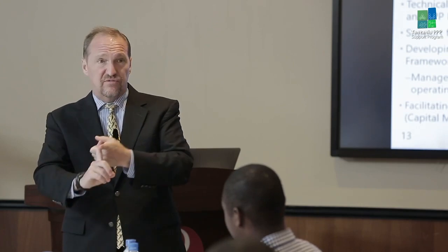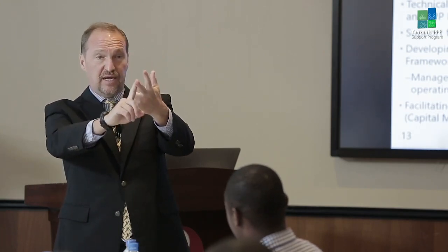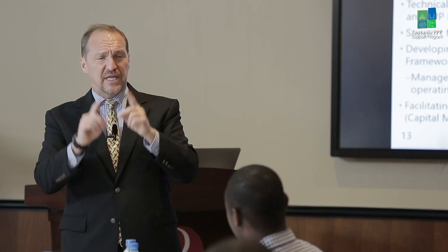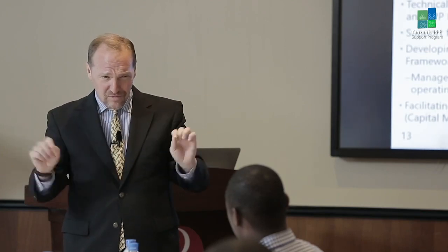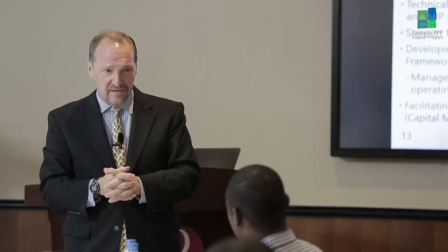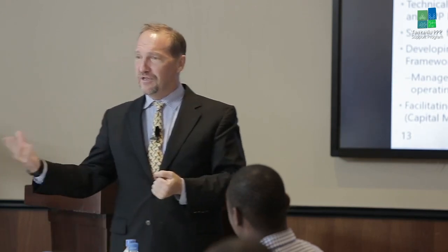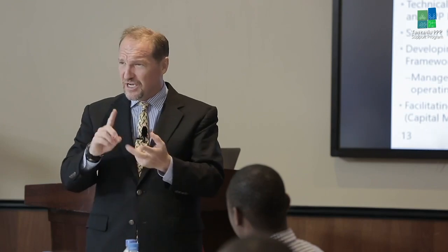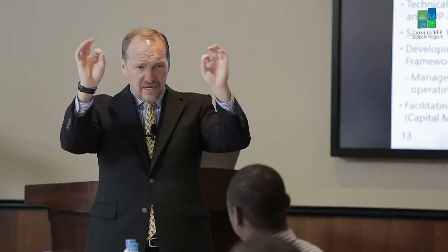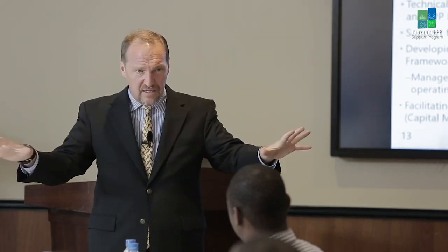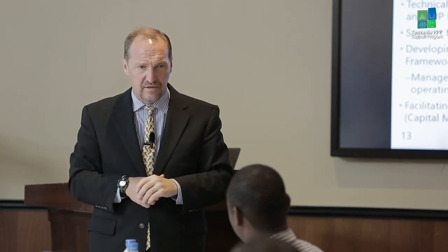A construction cost overrun, maybe a delay in the acquisition of land. But then you have to allocate every single risk very carefully to each party. So this is why PPPs take longer, as John mentioned, take more time and money to prepare up front, because we've got to identify, analyze, and then allocate all of these risks up front.